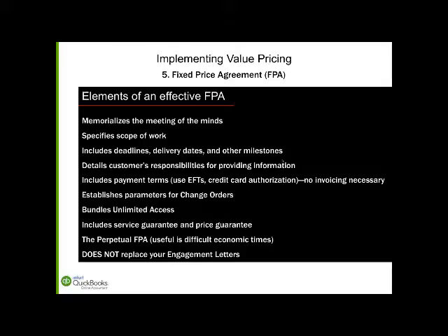It specifies the scope of work. And how detailed you want to get here is up to you. I prefer probably less detail than more. A lot of people think that you need to have a lot of detail with scope, but I don't think you do unless you're relying on the customer to provide certain things. Now, if that's the case, then you really want to detail what they have to provide to you, because you want to make sure that if they don't provide those things, you could trigger a change order possibly.